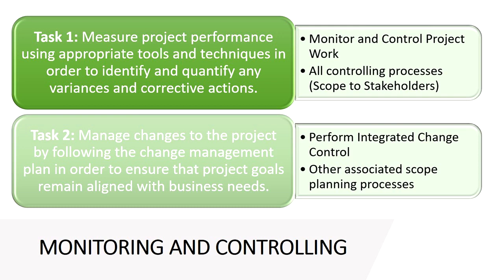After it gets logged into a change log for record, the project manager and the team can then begin to review the change request. As they review the change request and analyze it for its impact on time, cost, scope, quality, health, safety, whatever it is, they get to a point where they've got an idea of the impact on the project, and then that, along with the change request, is raised with the change control board.